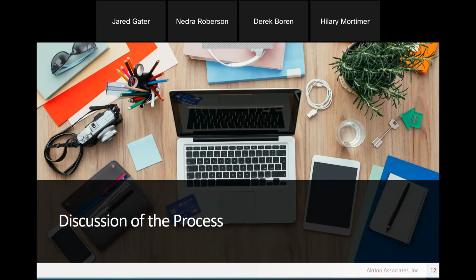This really, like Nidra said early on, saves you time when it's that same process over and over again. And even if it adjusts a little bit, because of profit center or a project manager or whatever that is, we can adjust rate tables that way. We can adjust multipliers that way. We can apply those as it goes across, as long as we've got a field to pull it off of to set those up. And I guess the same thing would work by client. Correct, yes. If you need a specific table by client or group of clients, we can totally capture that as well when it goes through and creates those and sets the billing terms up.